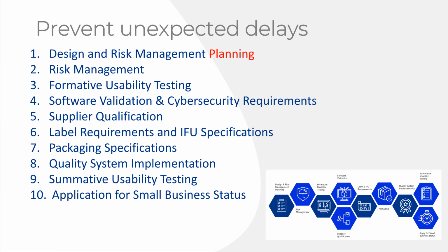So now we need 7 procedures before we even got into our first design review. Yes. So quality system requirements, you could probably delay a lot of the quality system until you've submitted your 510K, but those 7 you really can't afford to delay. And if you're going to be doing a clinical study, there's a few more things you're going to need as well. You're going to need CAPA, complaint, you're going to need a clinical procedure. There's a lot of things you need in the quality system, and you need to implement them earlier than you thought. Not to mention that if you're going after MDSAP, you might have a 6-month lead time trying to schedule a stage 1 audit.